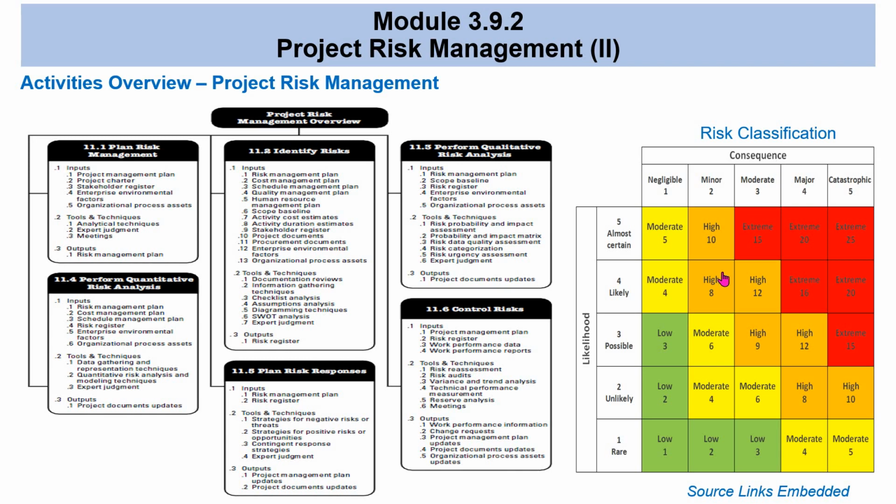So if a risk has a really low likelihood, which is rare, and no impact, then you can really say, well, it's low and it's negligible and it doesn't happen much. But even for risks that do not have high impact or consequence, the likelihood of them happening may increase, which means you don't neglect them but classify them as, for example, moderate.